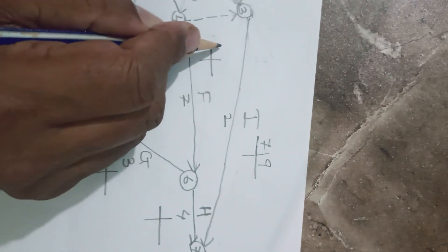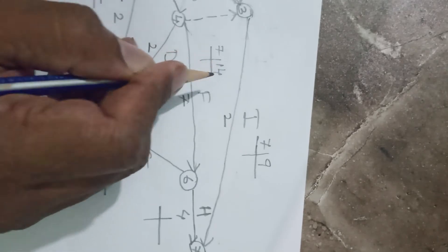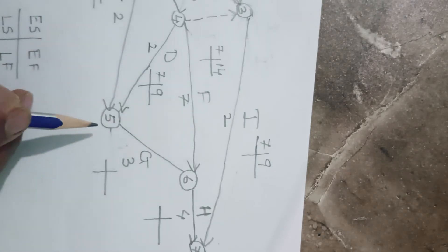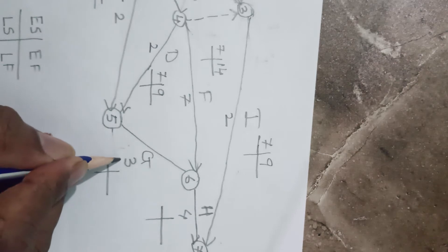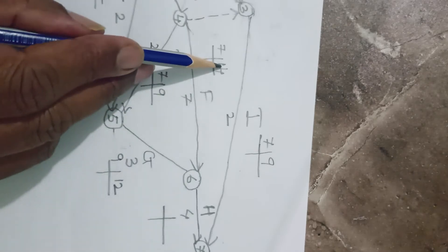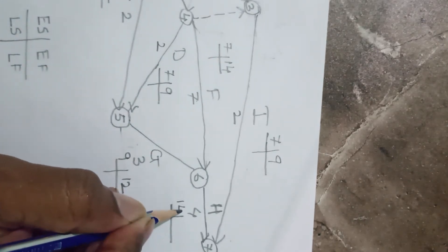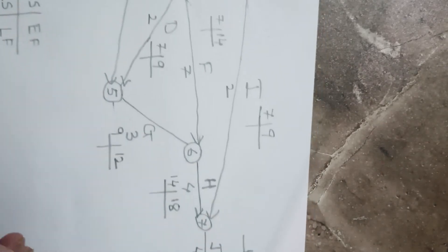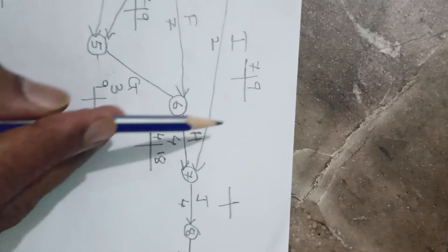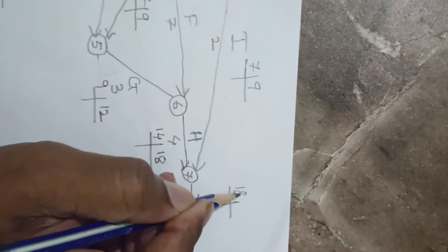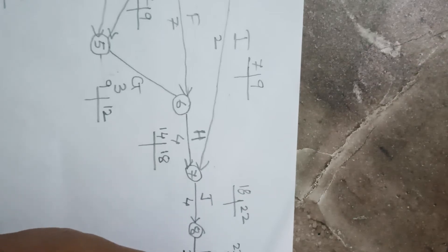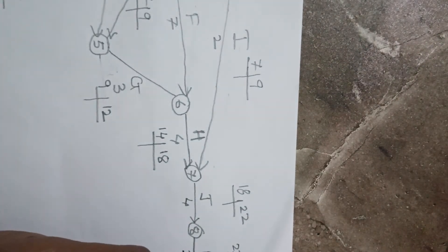This 7 also comes for F: 7 plus 7 equals 14. This 7 also comes for D: 7 plus 2 equals 9. For G, both 2 and 9 arrive, so we take the higher value 9; 9 plus 3 equals 12. For H, values 14 and 12 arrive, the higher is 14, so 14 plus 4 equals 18. For J, values 9 and 18 arrive, we take the higher 18; 18 plus 4 equals 22. Then 22 plus 1 equals 23.